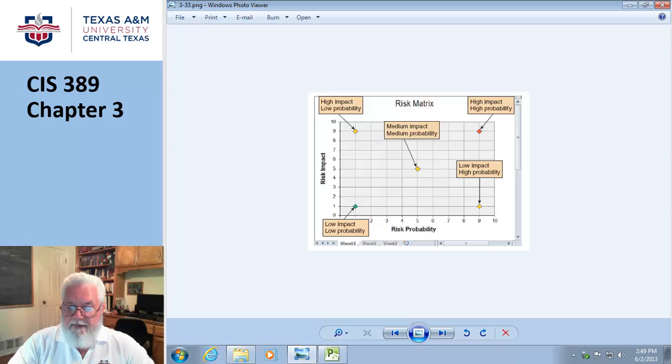Planning, scheduling, and monitoring and reporting all take place within a larger development framework, which includes three steps: creating a WBS, identifying task patterns, and calculating the critical path. Those are the three things you have to do in that planning phase. Task patterns establish a sequence of the work. Once you've established the pattern, you know what has to occur before another thing. The critical path is a series of tasks that, if delayed, would affect the completion date of the overall project. The most critical piece that has to happen.